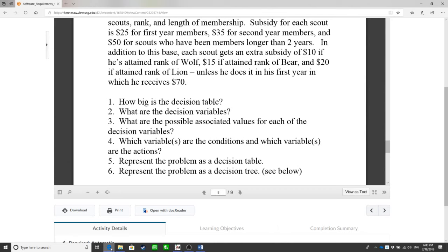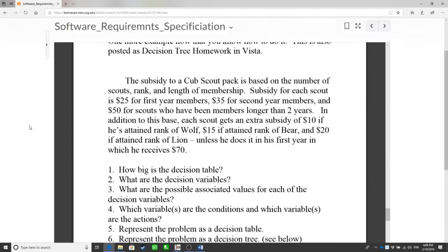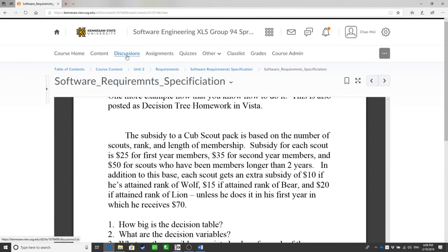The start and end are all dummy nodes. It's not a real activity. That's why all its duration is 0. All right. Okay, so probably that's everything in the midterm exam. Then I will talk about something else that is not in the midterm.